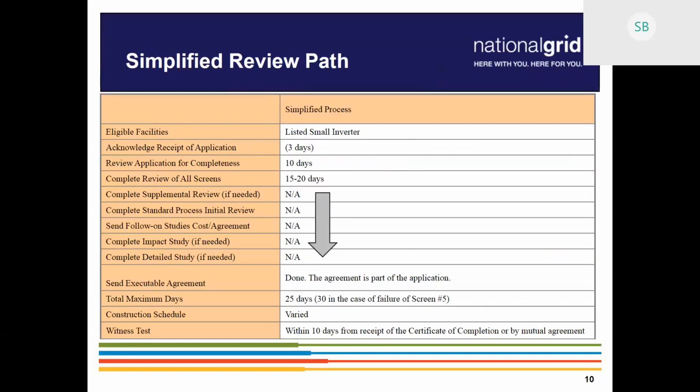And also, when you're filling out the portal, we often find problems with names and addresses not exactly matching within our system, husband, wife. Maybe the address isn't quite the same as on the bill account. So if you have a customer's bill already, take that with you when you're filling out our portal. If they match 100%, it helps the application go through smoother. Your application is not going to get put on hold and sent back for a simple thing.